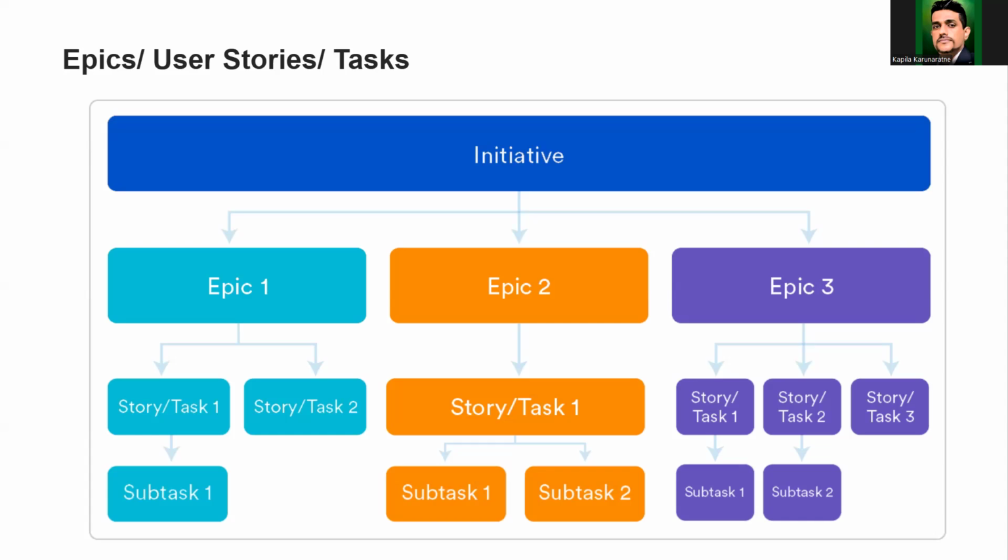For every epic there will be a large or small number of user stories, and those user stories describe what is supposed to be done. That's basically how agile manages requirements. There won't be detailed system requirement documents or detailed business requirement documents like the large documents we used to develop for a waterfall model.